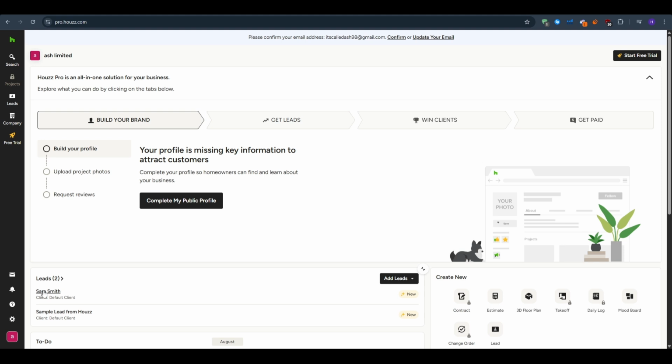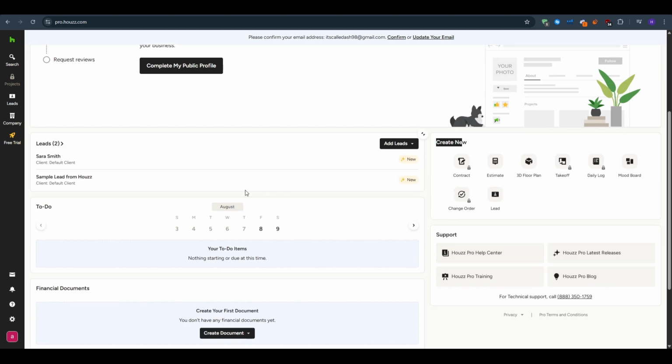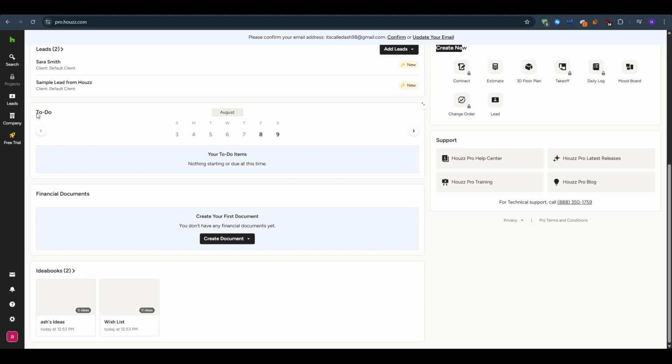So with a client record live, Houzz Pro offers a sequential roadmap that you will follow on almost every single job. The first one is the estimate, as you can choose a template, so whether it's a kitchen, bath, or deck, or built from scratch. You insert the labor categories, material allowances, markup, and send for e-signature. Second is the project schedule, so in projects you can drag tasks onto a Gantt-style calendar, slide entire phases when permits stall, and subtasks will follow automatically.